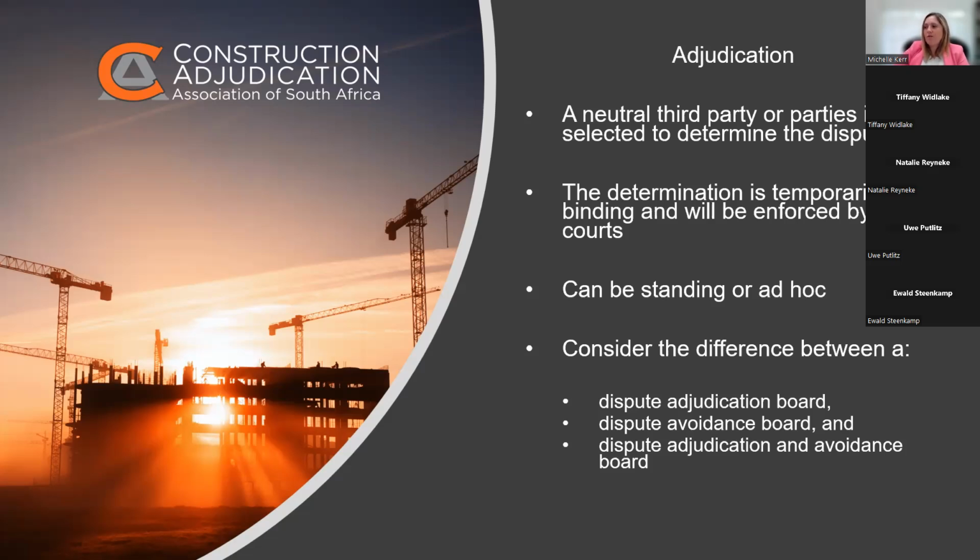We also have the other side of adjudication, where it's ad hoc, and that's an adjudicator who would be appointed as and when the dispute arises. And the advantage of that is you're obviously not paying a retainer fee to an adjudicator or adjudication board who's retained on the project and not necessarily dealing with disputes if the parties aren't very adversarial. And this person, it doesn't have to be the same person for each dispute.